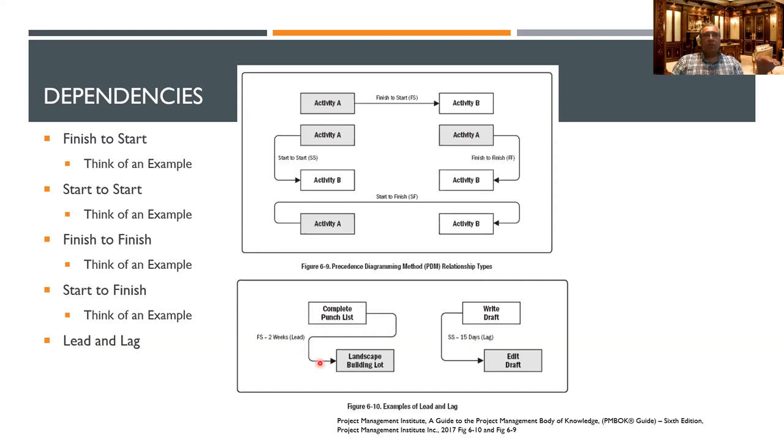So there's a 2 weeks lead before you do the landscaping. You're not going to do the landscaping until all the work is done. Let's suppose they're going to inspect the siding of the walls of the building. They're going to check the roof. Now something is wrong with the roof, or something is wrong with the siding, the aluminum siding. Now they have to fix it. Now they have to bring in heavy equipment again. If you do the landscaping, then if you put the grass there, it's all going to get messed up. They have to bring in the heavy equipment.